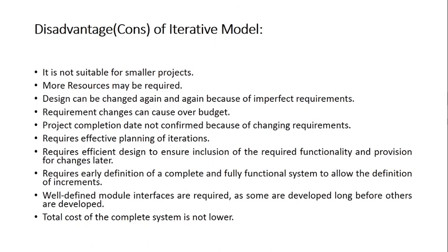If it is the waterfall model, we would have developed the entire software in 1 year, and the cost is for that 1 year. But since you are developing it using an iterative approach, with gaps between subsequent iterations, and maybe the entire set of iterations is delivered over 5 years, the overall cost will definitely be more, because you have to take the summation of the individual iterations to calculate the final cost. So these are the disadvantages of the iterative model.